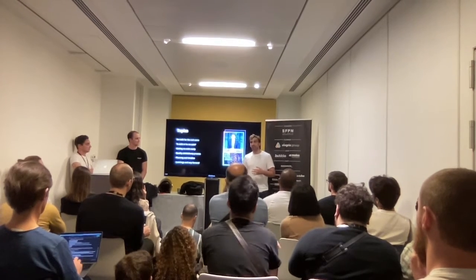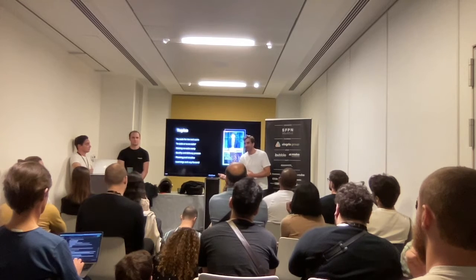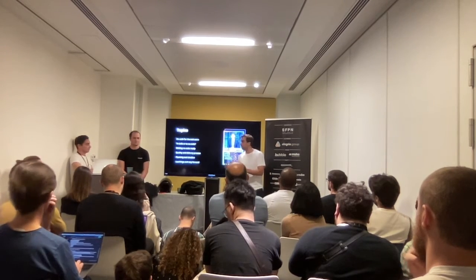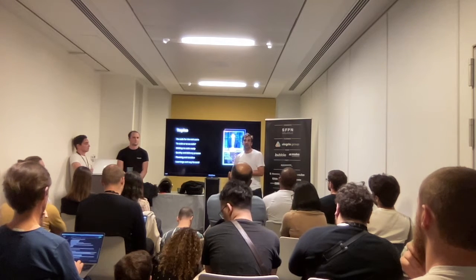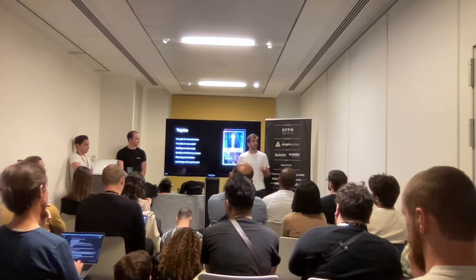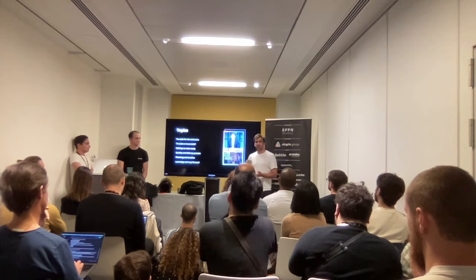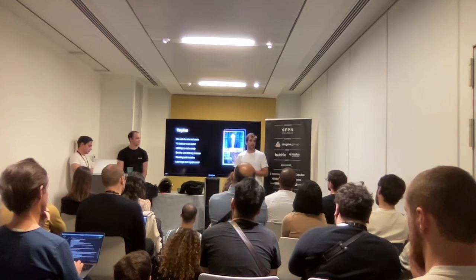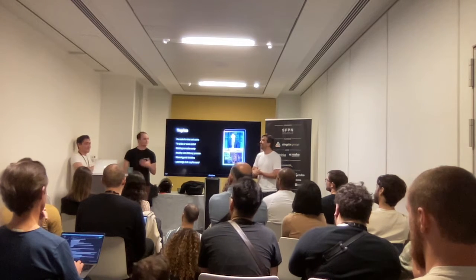And each step is clearly defined, and we don't jump into the code or no code before having a clear use case, clearly identified, and a QA plan that shows you the acceptance criteria of your integration. And you also have acceptance criteria on the performance, on the alerting. You build by also thinking about the edge cases that may occur and break things. And yeah, sure, you can go on.